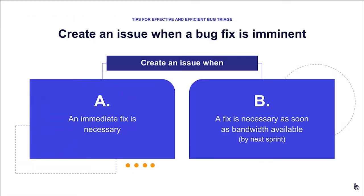When should you create an issue in your issue tracker? We recommend the following: if an immediate fix is necessary — in other words, if you triage a bug and say 'we have to do something about this now' — an issue should be created to track that intent to do work. Also, if a fix is necessary but not so urgent that you'll stop current work to get it done, but you're going to bring it into the current sprint or definitely plan it for the next sprint, both of those are great opportunities to create an issue.